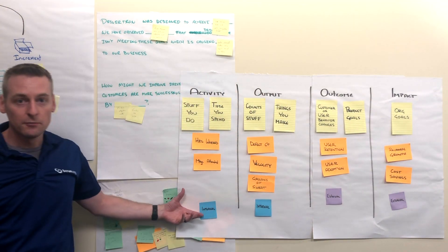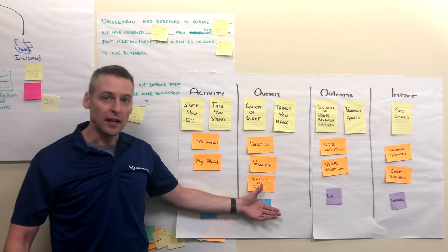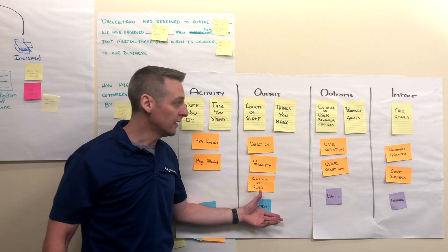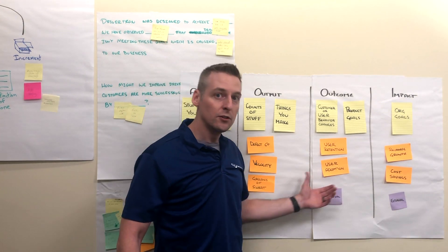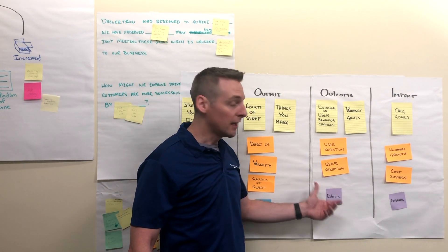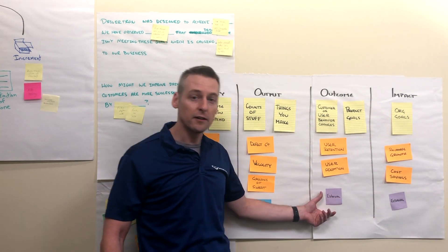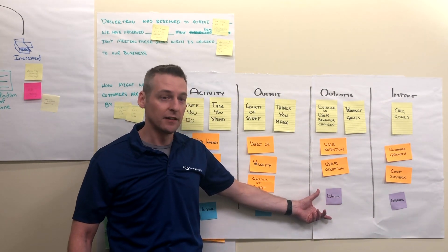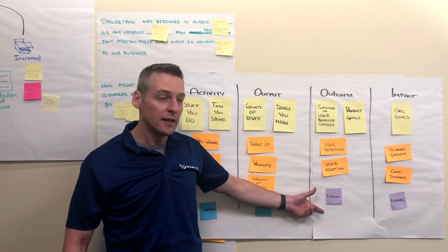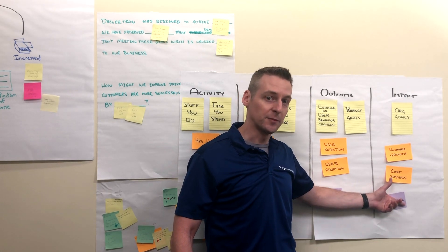In other words: last sprint, we spent 300 hours to build these eight PBIs. Because we created these eight product backlog items, we created a new checkout workflow in our CMS system. In that new workflow, we reduced cart abandonment rate by 7%. Because we changed that user behavior, it had an organizational impact of raising our revenue by 6%.